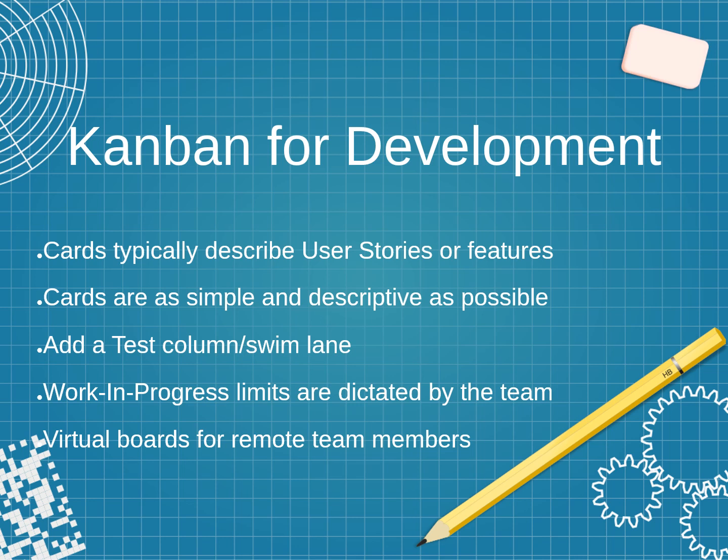There are usually less specific role functions among the team for Kanban. Individual members decide what is appropriate for them, which cards to choose, and move through the workflow. There is less need for dedicated tasks to go to dedicated members in most cases. A development team or any production workflow can adapt the Kanban categorizations and the columns or swim lanes for their own purposes, but a development team might want to have a test column as well as the typical to-do, doing, and done columns.